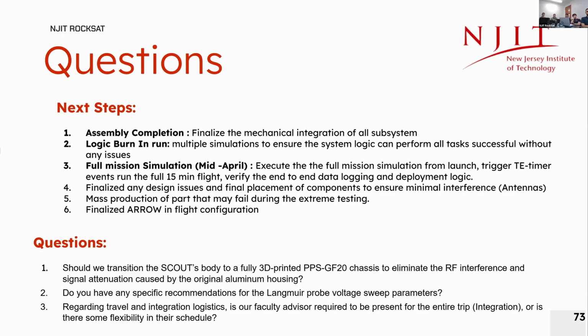Logic burn and run multiple simulations to ensure the system logic can perform all tasks successfully without any issues. A full mission simulation in mid-April: we're basically executing a full mission simulation from launch, triggering TE time events, and a full 15-minute flight to verify end-to-end data logging and deployment logic.